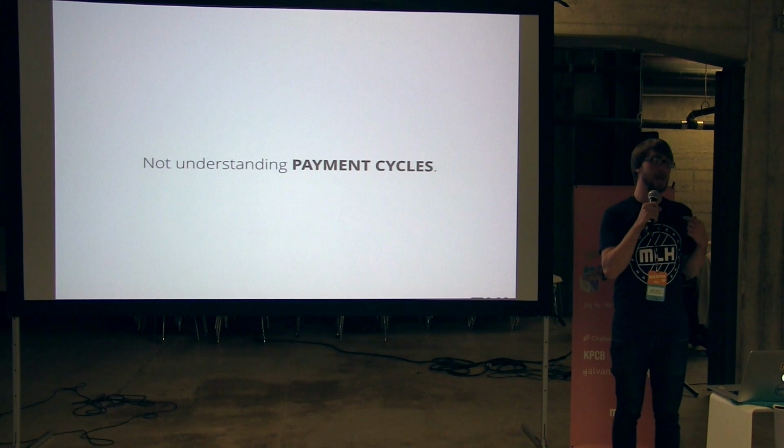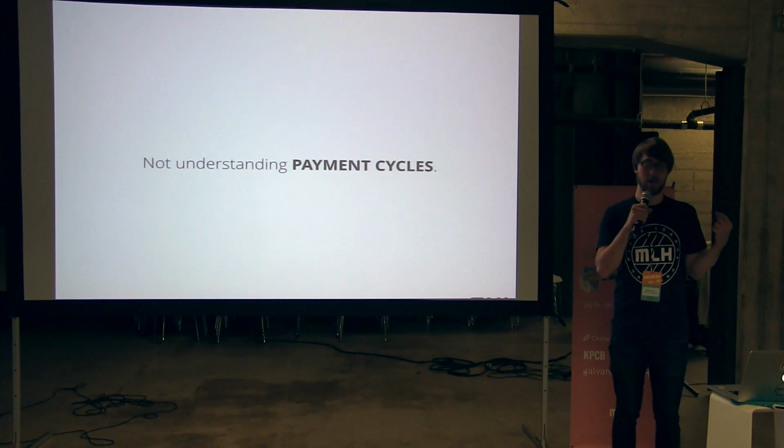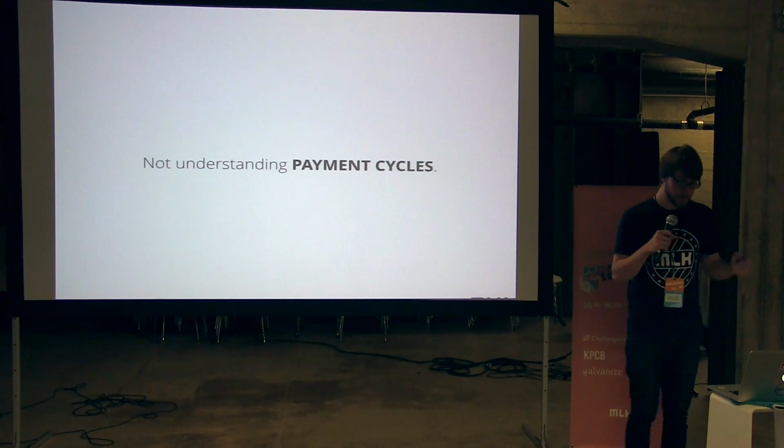There are certain things like paying for venue costs or maybe some food that you can defer until after the event and pay after the event is over, and that can help with payment cycles.